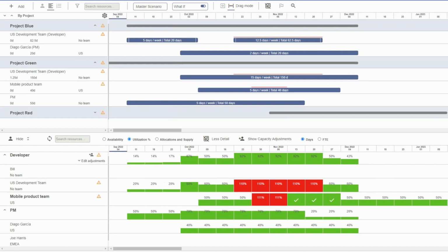So what kind of things can you model with what-if planning? What-if planning can be used to see what happens if you change project timings, projects take longer than expected, you hire or fire resources, or you cancel or include projects. When you perform a what-if, you can run the changes across your current plan, or you can run the changes across a scenario. Scenarios are like versions of plans and let you test out changes without affecting your current plan. You start by opening the what-if option.